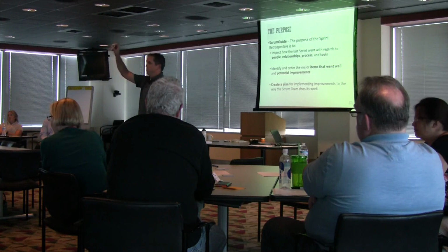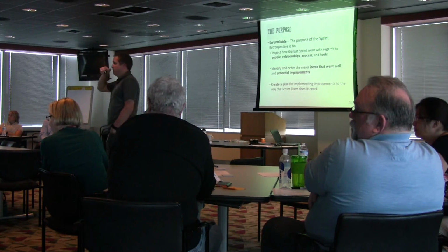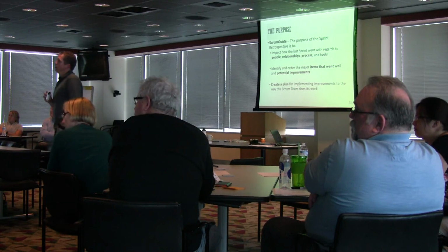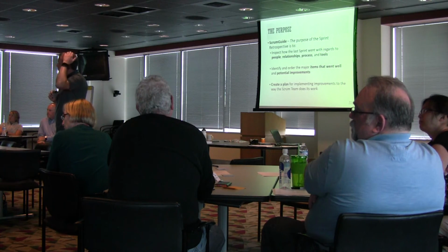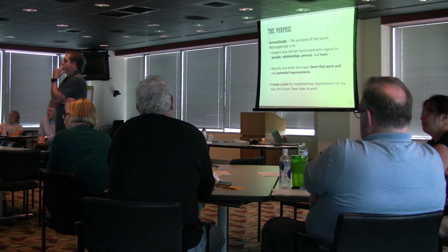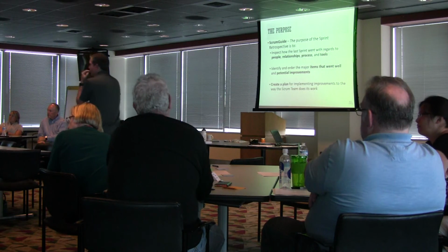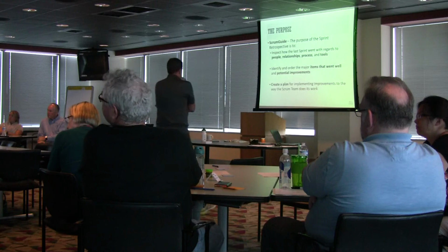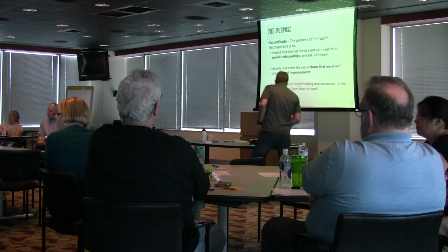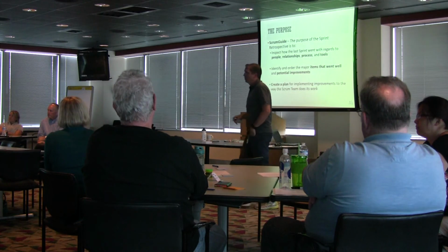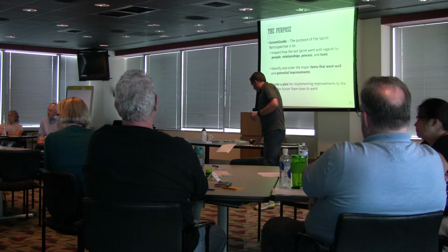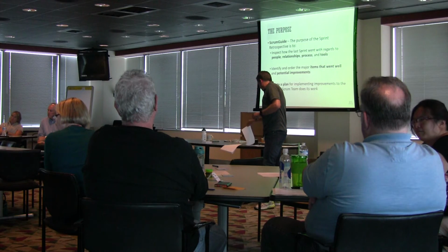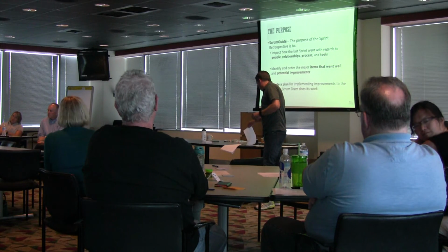I was just gonna say, at the end of our retro, we have a list of things people suggested that we work on. As a team, we agree on 2 to 3 that we wanna try, because you can't fix 10 things at once. You can maybe fix a couple. Agree as a team that we're gonna focus on these 2, and then come back to it at the next retro and say, did that work? Should we keep working on these? As a team, you hold each other accountable, and you know exactly what to do.